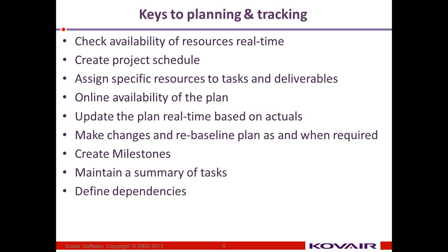plan based on the reflection and re-baseline it, so that at the end of the project we can easily compare the actuals with the original plan or the baseline versions, which will give us historical data to preserve as lessons learned, that these are the areas where we need to improve on upcoming projects.